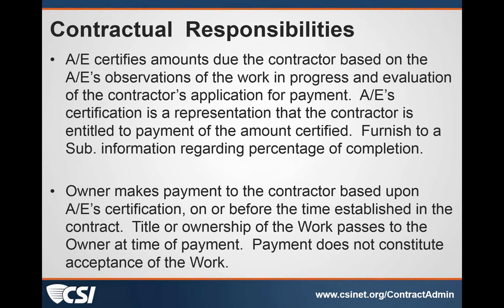Kevin asked a question. I'm going to paraphrase. The EJCDC documents do not require the design professional to certify the pay app. The language that they use is recommend. AIA language is certified. The question is, why would AIA require something more assertive, something more of an obligation than just to recommend payment? I don't know that for sure.